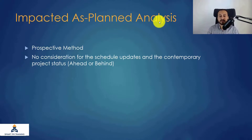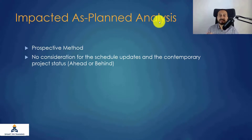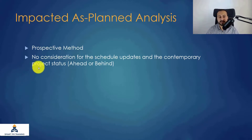If there is one event from the client right now, there is actually no impact because I have a one-month buffer and the current status shows I will finish earlier than the project completion date. But for the Impacted as Planned analysis, I am showing the event on the baseline anyway and just showing my entitlement — there is no consideration for the schedule update or contemporary project records such as recent schedule updates.